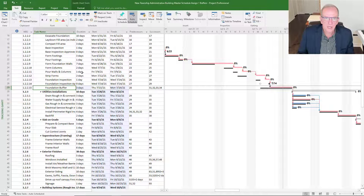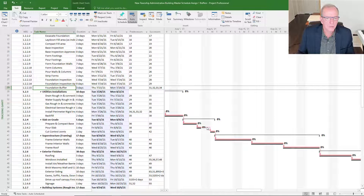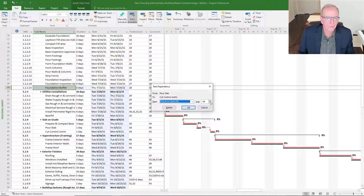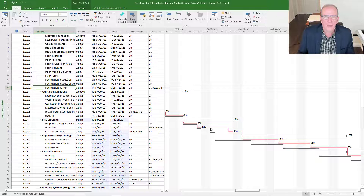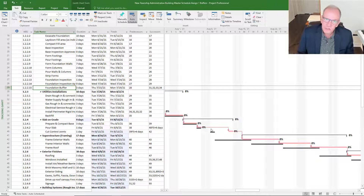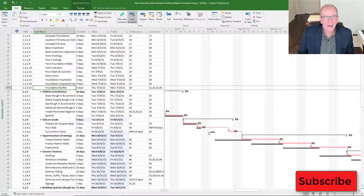Next to that is lag time — just a quick demo in case you're wondering what lag time means. I double-clicked on the arrow (the dependency link) and I could put in a four-day lag, which stretches that out. If I started with a lag time I could always shorten it later on, but I'd have to remember those buffers are in place and people may ask why there's a lag time between the inspections. That's why I'm saying you might as well just be transparent with it.